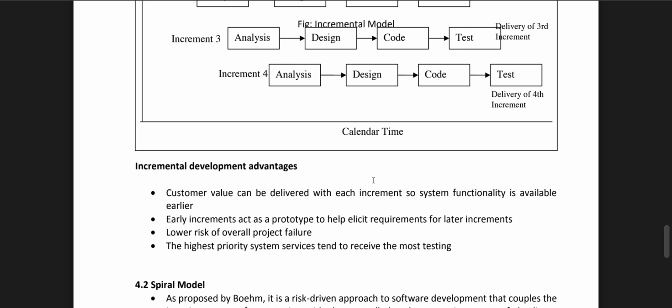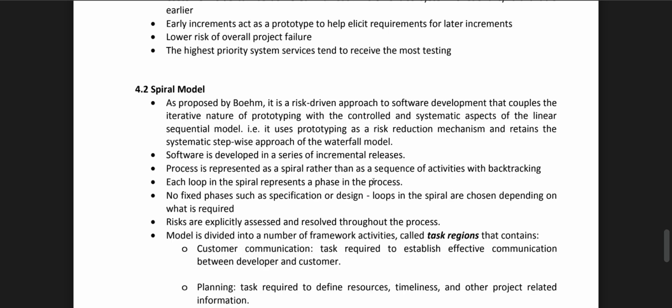Incremental development advantages: customer value can be delivered with each increment, so system functionality is available early. All increments act as a prototype to help elicit requirements for the later increments, and lower the risk of overall project failure. The highest priority system services tend to receive the most testing.